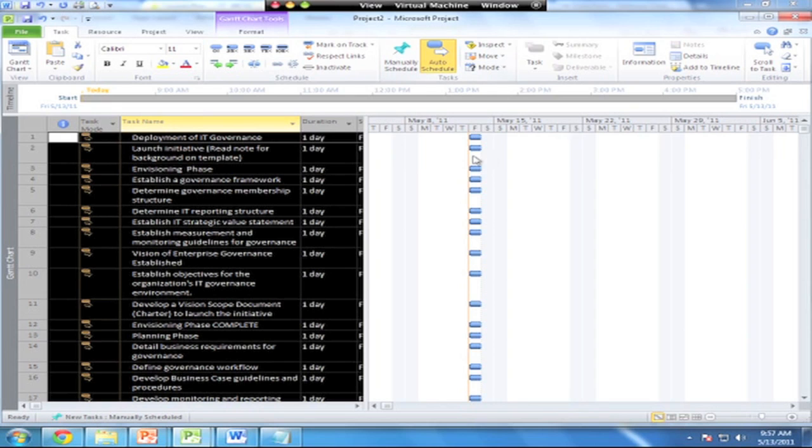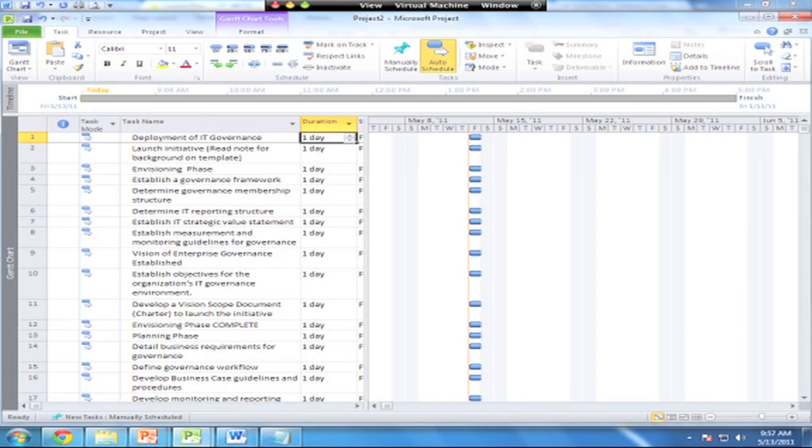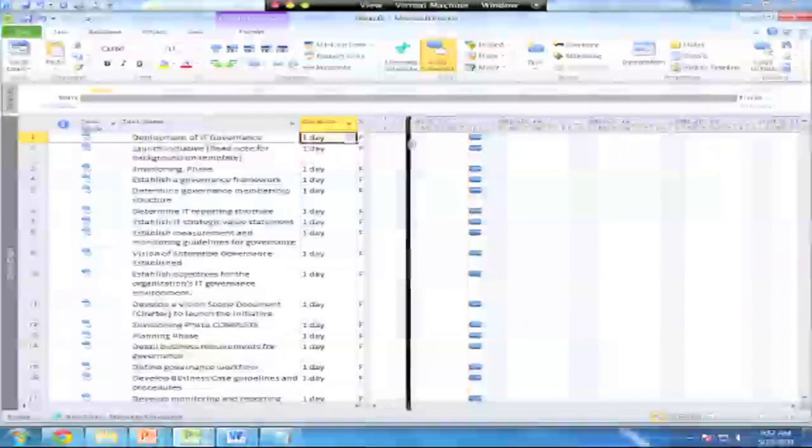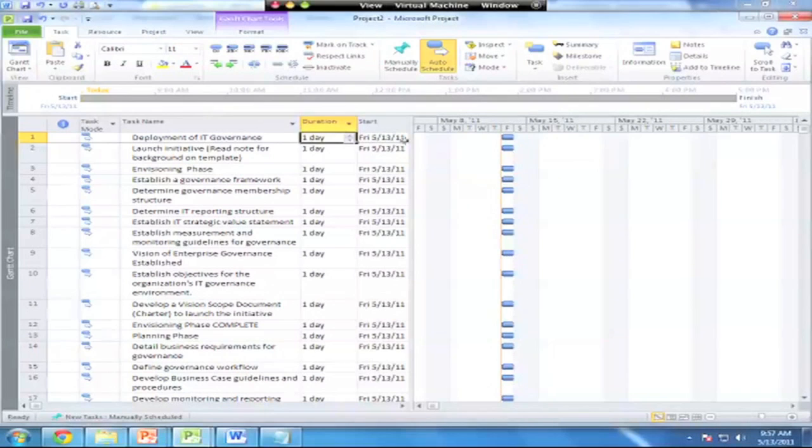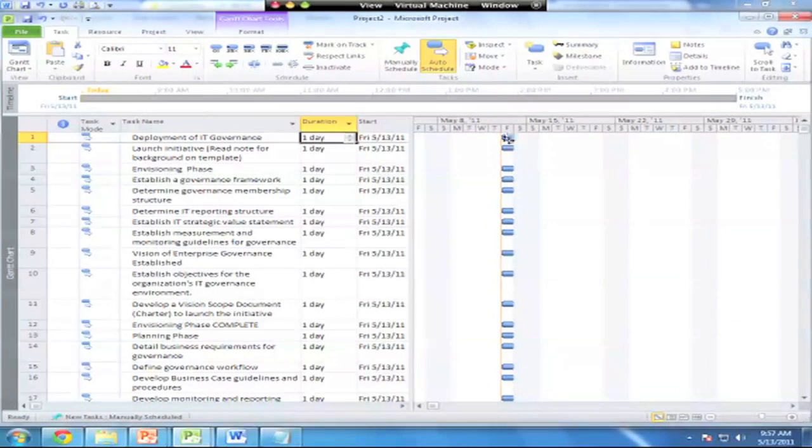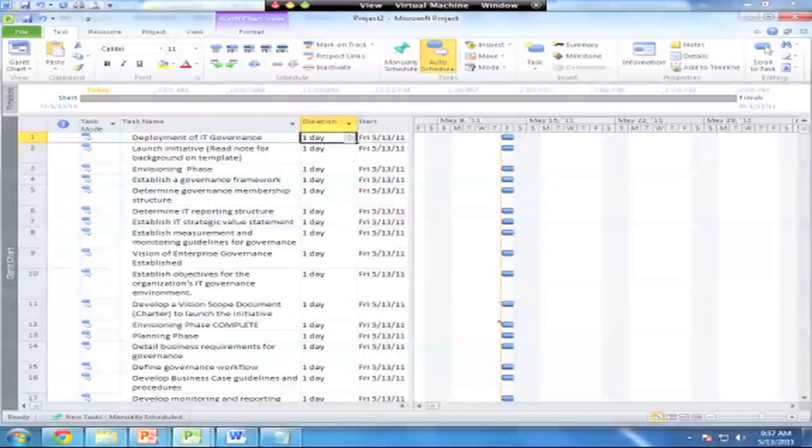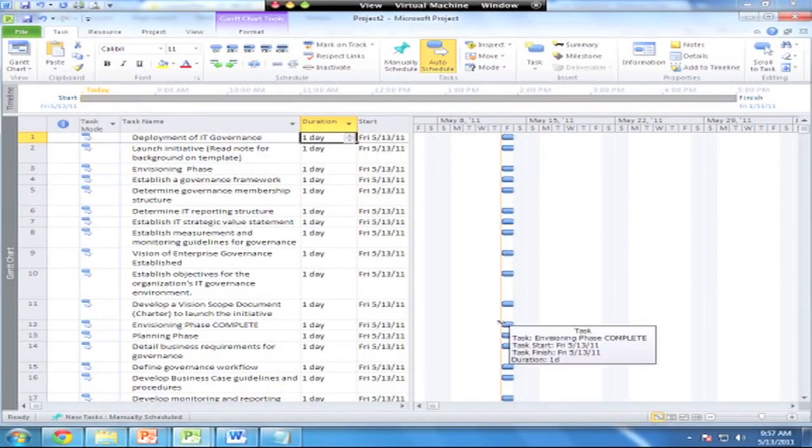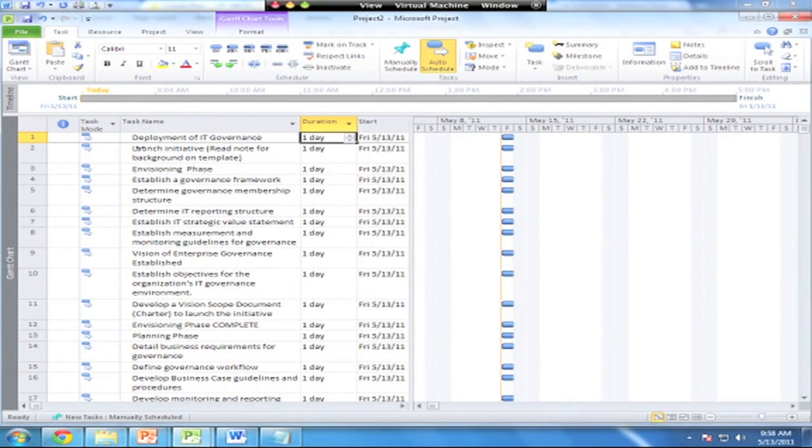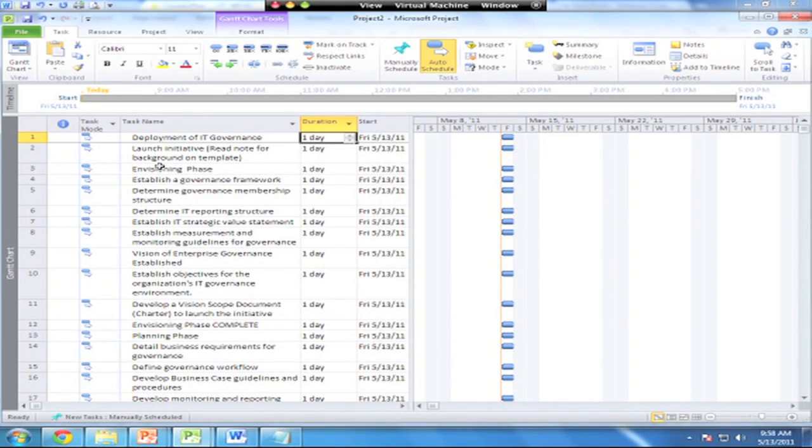If I highlight all of those, I can switch those over to auto-schedule, and this now ties all these tasks together. You notice that I've got a default duration set on all of them now for one day, and they show up on my Gantt chart as basically it looks like I've got to do all this work in one day, right? That's not good.